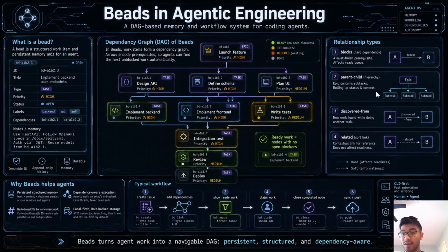This is the same way that it is in Jira, but beads are basically just a Jira ticket for your agents. Blocks are very important because they ensure that the agent doesn't execute beads that are not ready to be worked on. And this is how beads usually go. They're created, the dependencies are added later, and then once they're done, the agents can run a command like bd ready to see which beads are ready to be worked on. They'll claim work, they'll execute on the work, and then they'll finally push it to main. So that was all a little fast, I know.